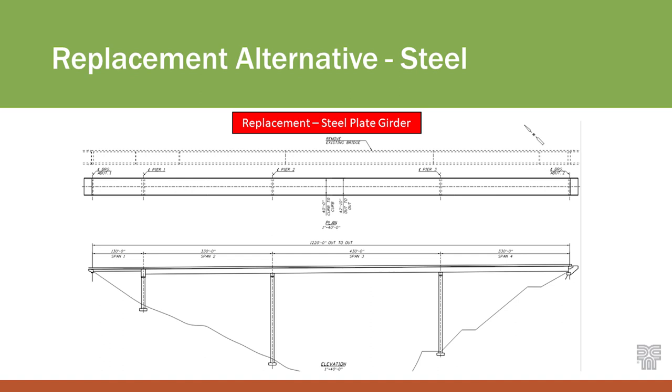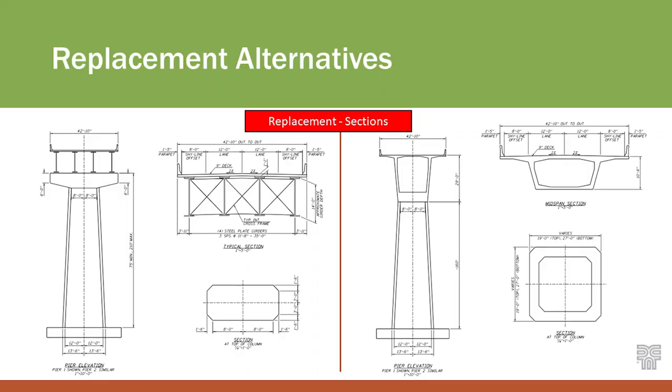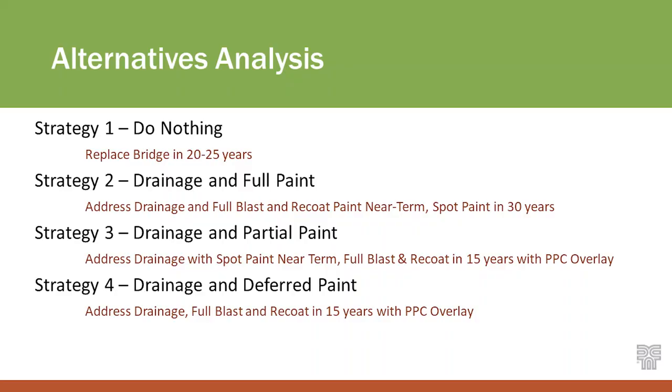For replacement, we looked at two options: one was a steel plate girder with a 430-foot main span and 330-foot end spans. The second option was a cast-in-place segmental structure with a 530-foot main span and 345-foot end spans. These are just concepts to get a ballpark cost of what it would cost to replace the bridge so we can plug that into the plan. Notably, the pier height is between 160 and 200 feet high — it's a major structure and expensive to replace.